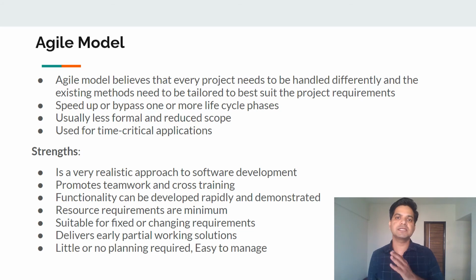But not all the features get developed in one iteration. They get broken into multiple features, and there could be iterations of 2 weeks or 1 week, and depending upon the iteration, there is flexibility to cut down any one of the phases and just move on to the next phase to accomplish the target. This is the kind of flexibility we have in agile, which also gives the customer the flexibility to change the requirement or update any portion of the requirement if required.